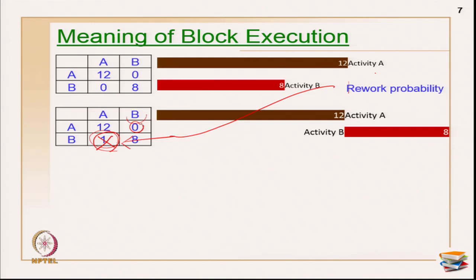If you look at the 0 value here - as a result of any change in B, A will never repeat because I have given 0% probability. Zero implies it never repeats; 1 implies 100% repeats. Suppose if I give 0.1 as my value, as a result of any change in B there is a 10% probability that A repeats. If 0.2, there is a 20% probability that A will repeat - that is how it has to be interpreted.